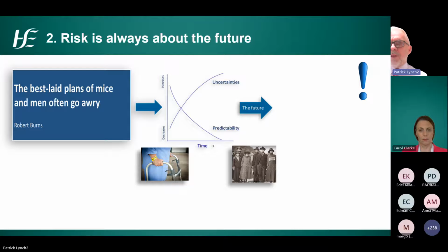And the first I've said, because risks are always in the future, we know that if something has happened or is happening, it is not a risk. So I'll repeat that. They're always in the future. So if something has already happened or is happening, it is not a risk. As we saw already, risk is defined by uncertainty, and therefore an issue, including the most serious incident, is something that has already occurred, and there is therefore no uncertainty about it.